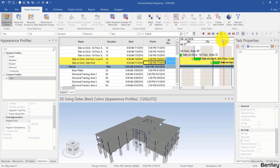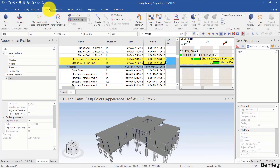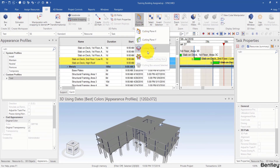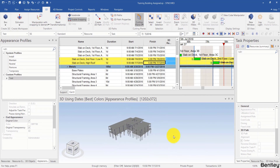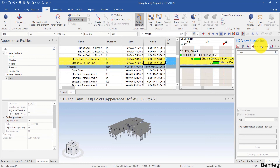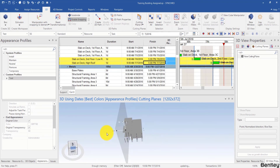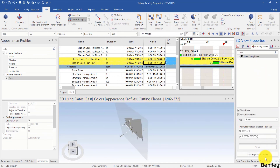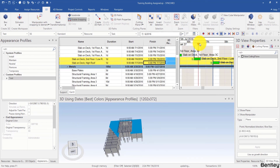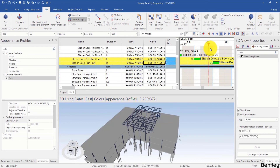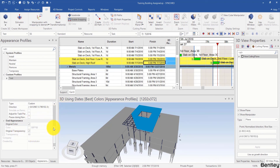As a bonus point, we will talk about an easier way to customize the growth simulation direction. We can go to the 3D ribbon and activate a cutting plane on X, Y, or Z, or go to the 3D View Properties ribbon and the Cutting Planes tab, then right-click and add a cutting plane. When you check the box in front of it, it's activated. You can change its location or rotate it. Once positioned, select the cutting plane and click 'Use as Growth Direction'. You can then uncheck the cutting plane box since it's no longer needed. The direction is automatically copied to the test profile's growth direction, and when you drag the focus time, the slab will grow based on the direction of the cutting plane.